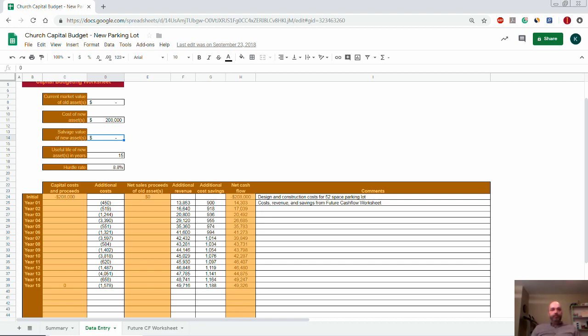So when it comes to salvage value here or anything else you're forecasting, you're like, I have no idea where to begin. Fair enough. Okay, start with a number that's insanely high. The salvage value, like, there's no way we'd get this for it. Then start with a value that's absurdly low. Might be 0, might be another absurdly low number. And then just kind of work your way from each side. Hence the term, narrow it down from there. Then you think, well, okay, this is a pretty reasonable range. Use your judgment, but then I would still err on the side of being conservative. Okay, on the low side.